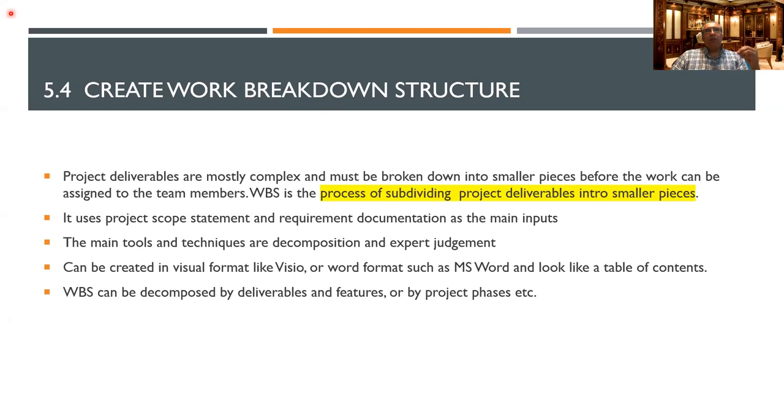We're discussing today in more detail the scope and the schedule. In the schedule, you look at activities, which are more detailed. The WBS is very high level. I told you in the example, it usually goes down one level and then two levels, and that's about it. It doesn't go into too much detail. The main purpose is that you decompose it down to a level where you can give it to somebody, allocate it to a group or a team. We're going to do this today. We will develop a simple WBS. I'll do an example, and then you will do it also in your breakout rooms. Then it can be decomposed further.